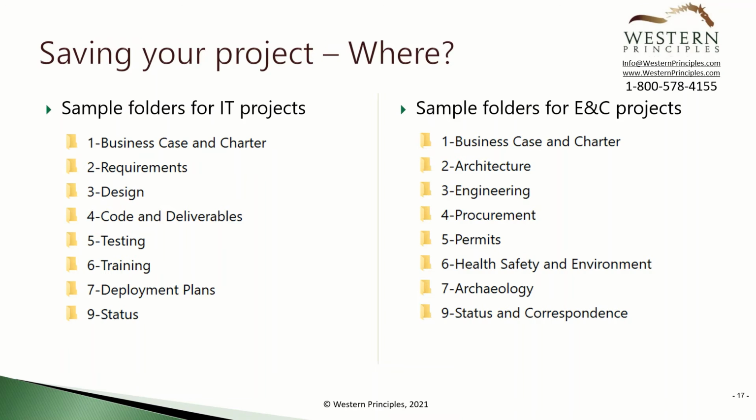As food for thought, you may want to establish a set of template folders that you copy over to a file server for every new project you create. You might want to name these as shown in these examples. Of course, you may have other folders or fewer folders depending on your needs. You should set a standard across your organization of always saving your Microsoft project schedule to a specific folder, like the status folder in this case, so that everyone knows where to look for it.